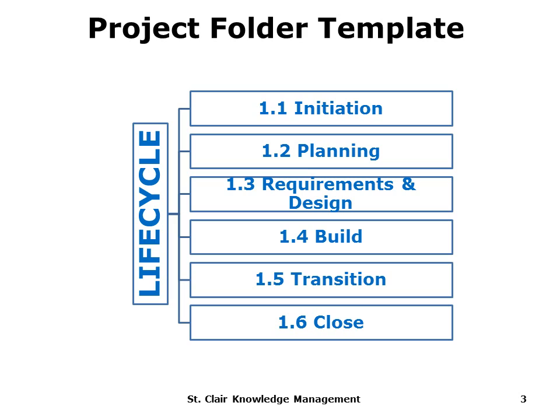Basically, the life cycle is really just a way of organizing your work to support the goals and the needs of your client, of your sponsor. This particular life cycle consists of six phases: initiation, planning, requirements and design, build, transition into the live environment, and close.